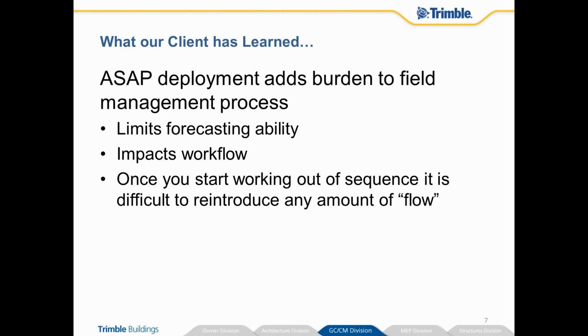What has our client learned? Really that ASAP deployment adds burden to the construction process. It impacts our ability to forecast work effectively, and most importantly, it impacts our workflow. And we'll start to look at some of those examples of how working out of sequence or completing only so much of a location before moving to the next location makes it very difficult to reintroduce any resemblance of continuous workflow through locations.